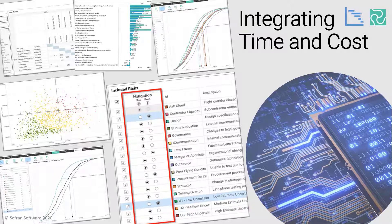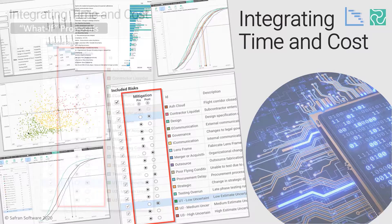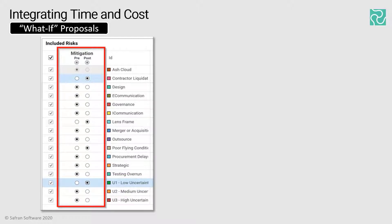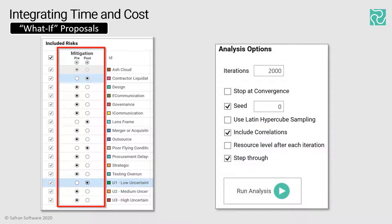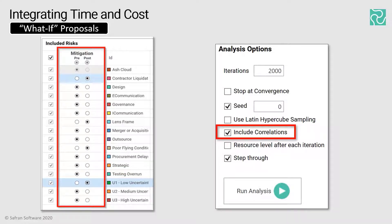I'd like you to remember that it is easy to create what I would call soft what-if scenarios with minimal administrative fuss. For example, with the risks and uncertainties to include or exclude, whether they're at pre- or post-mitigated positions, and whether the correlation matrix is switched on or off. This enables and makes the following example so much easier and natural to perform.